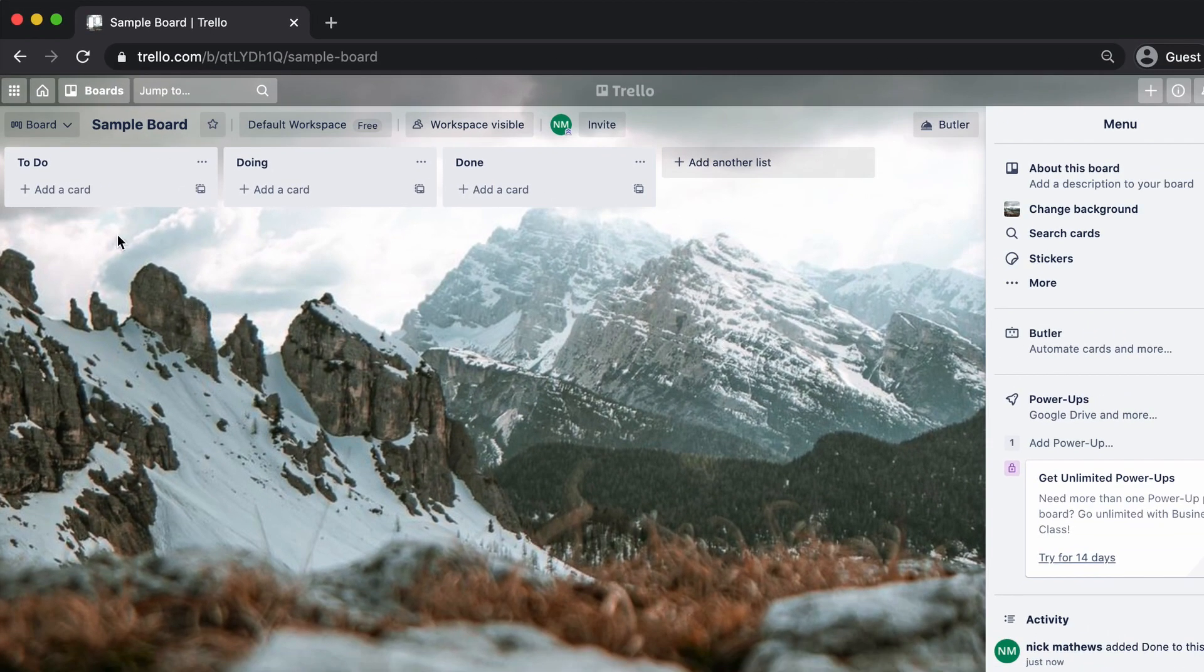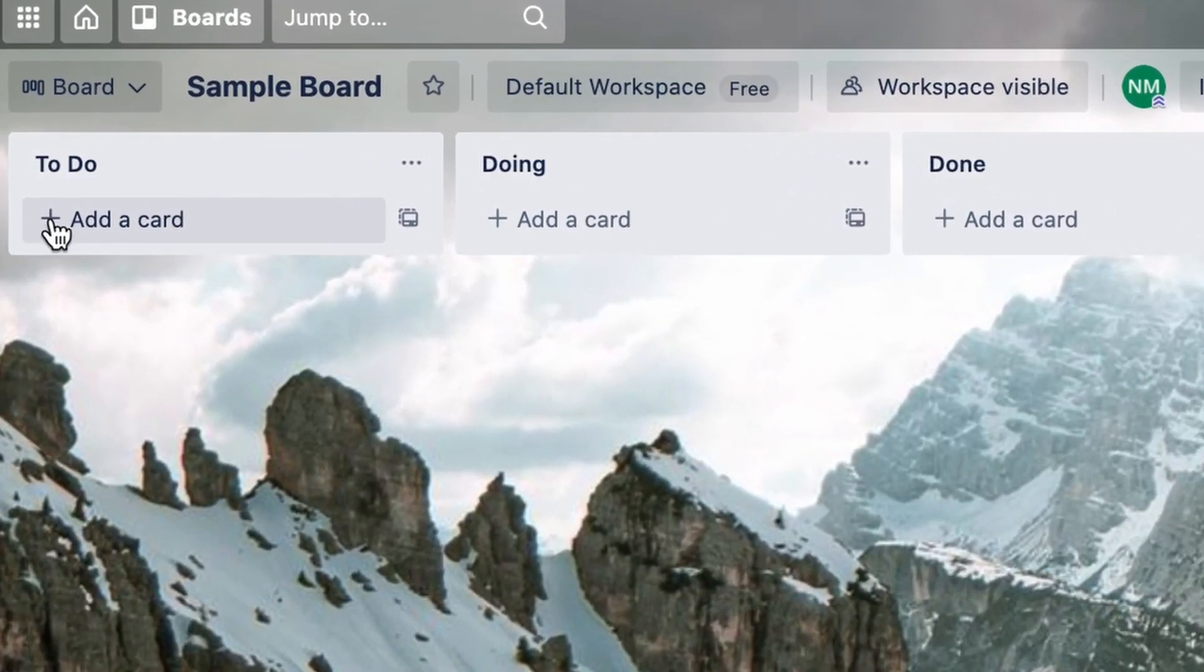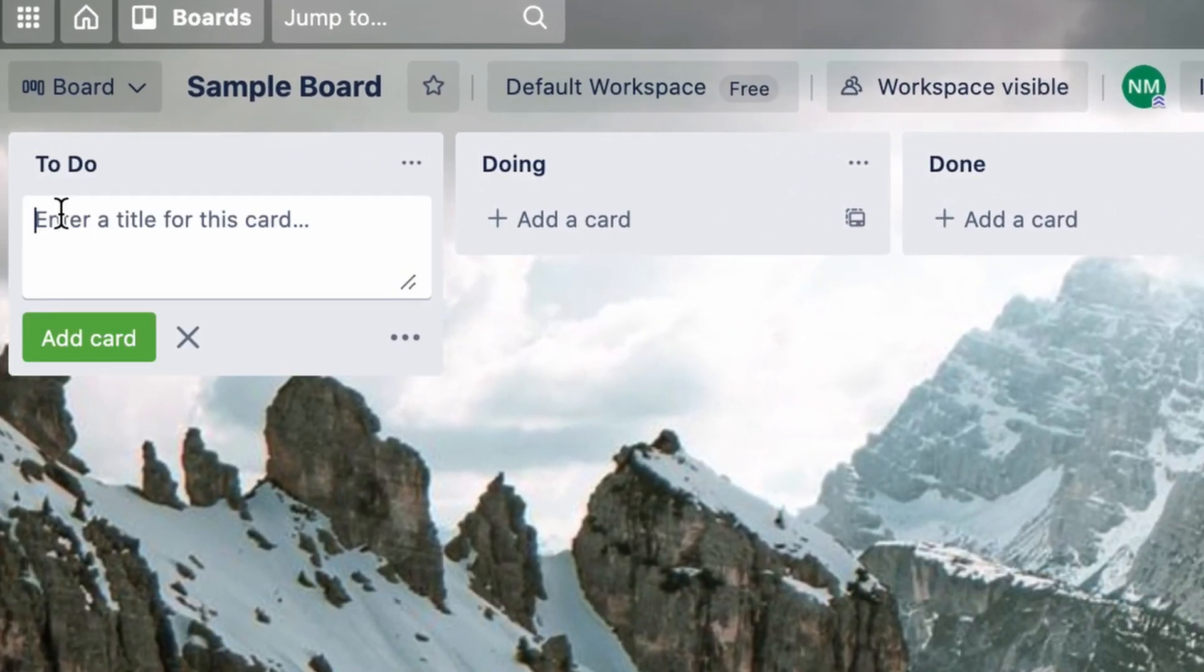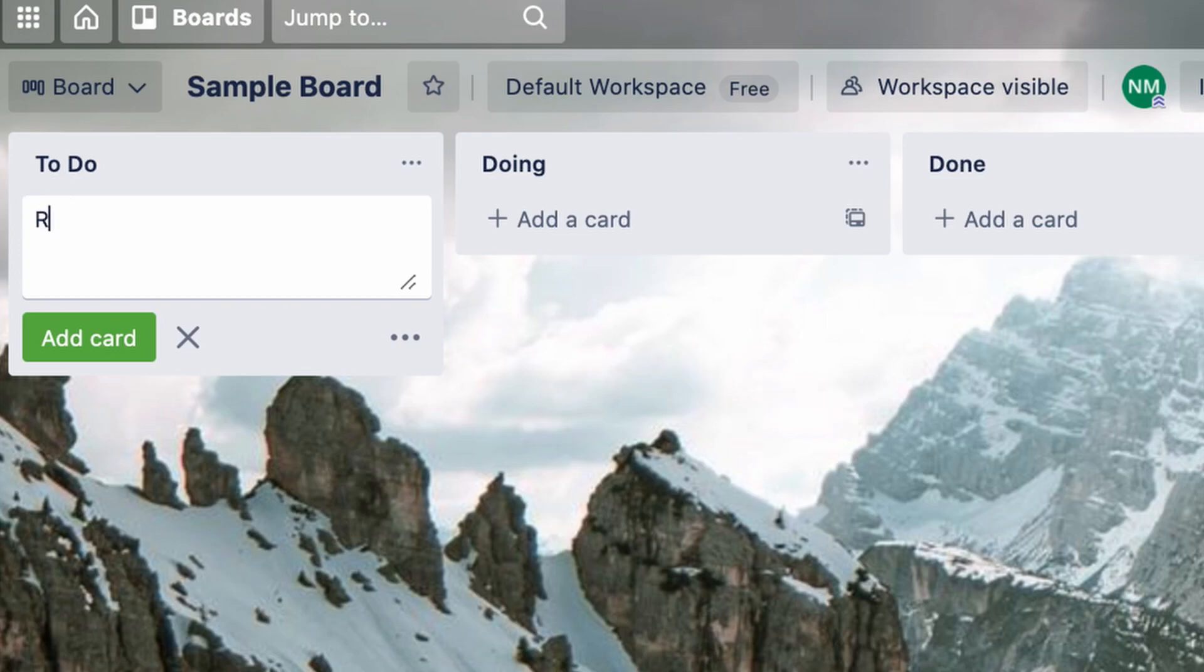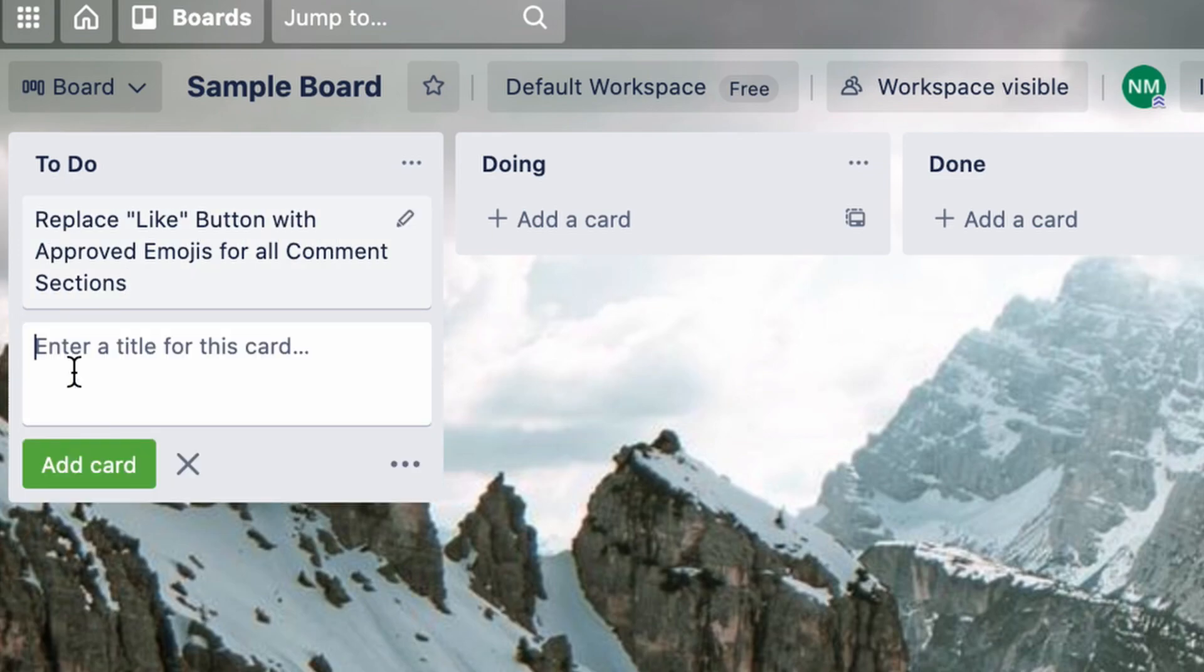Once the work stages are set up, we can start filling it with cards. Cards represent work items. We'll make a sample card now. Click add a card, type in the title of the work item, and then hit add card.